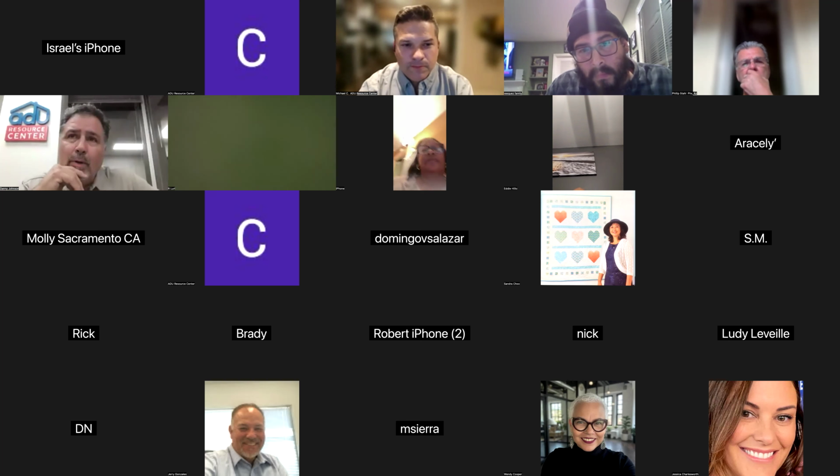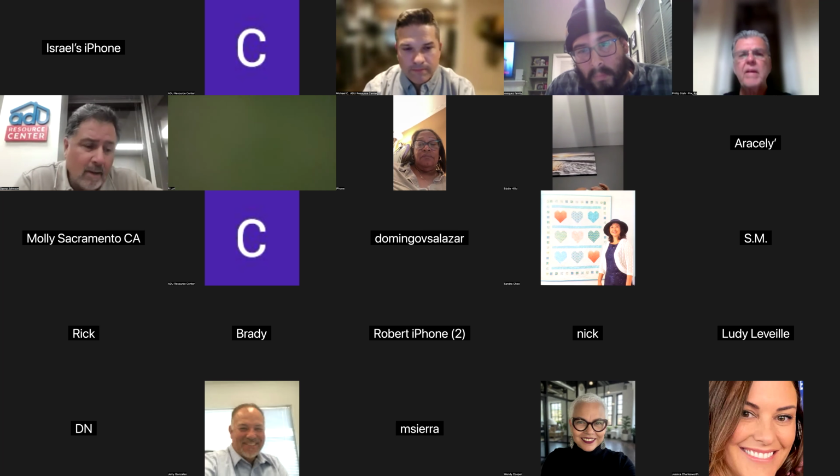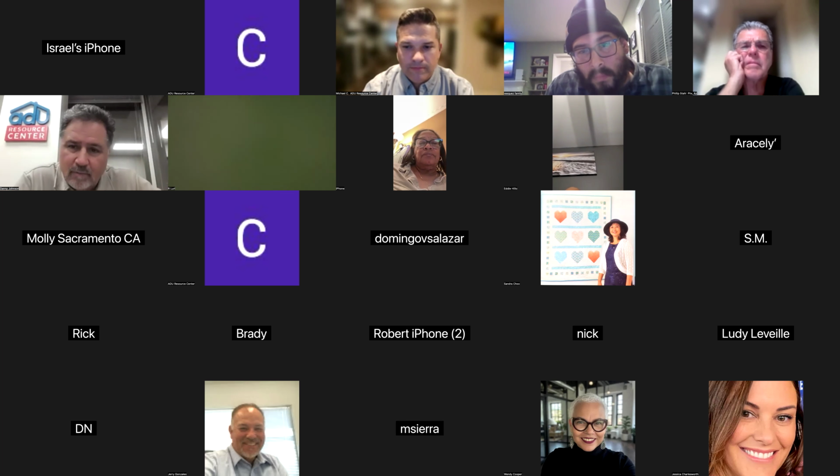So if you said, well, we went to Floor and Decor and we fell in love with this tile, and our allowances say $2.65 per square foot on anything miscellaneous. It could be flooring, could be tile, could be anything. But you found something for $3. Get it. Pay the difference, right? Because we want you to be happy. We want you to design and develop and build with love. Just because the allowance fits the budget, a couple extra bucks for you to fall in love with it is money well spent. We want you to do that. Now, we won't raise the budget, but you're entitled to. You can, certainly.